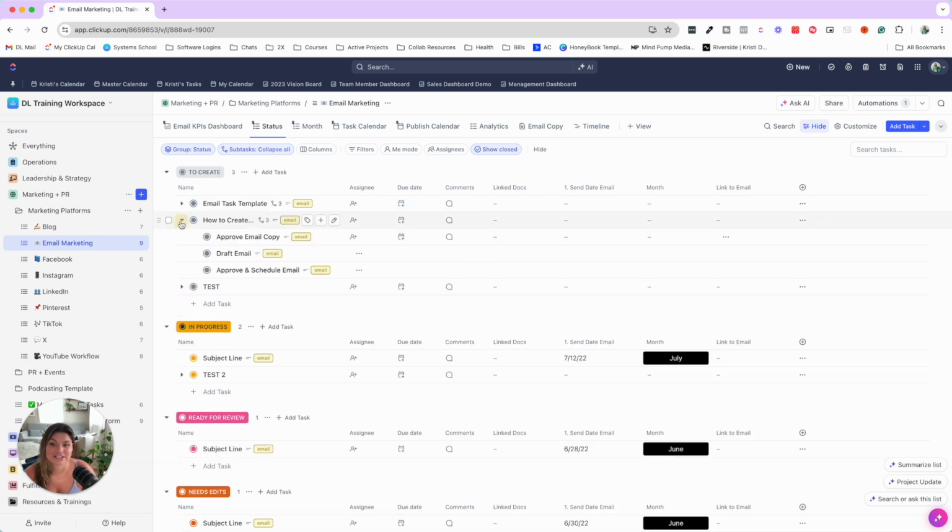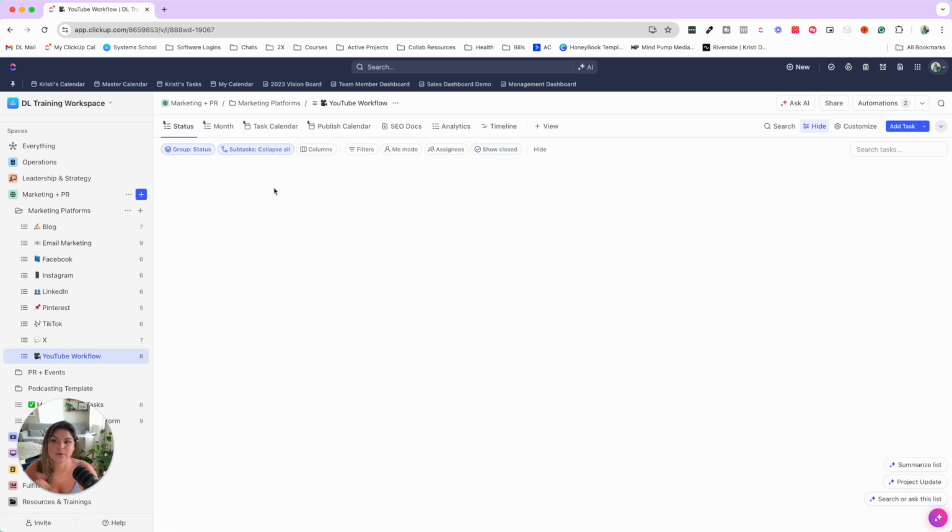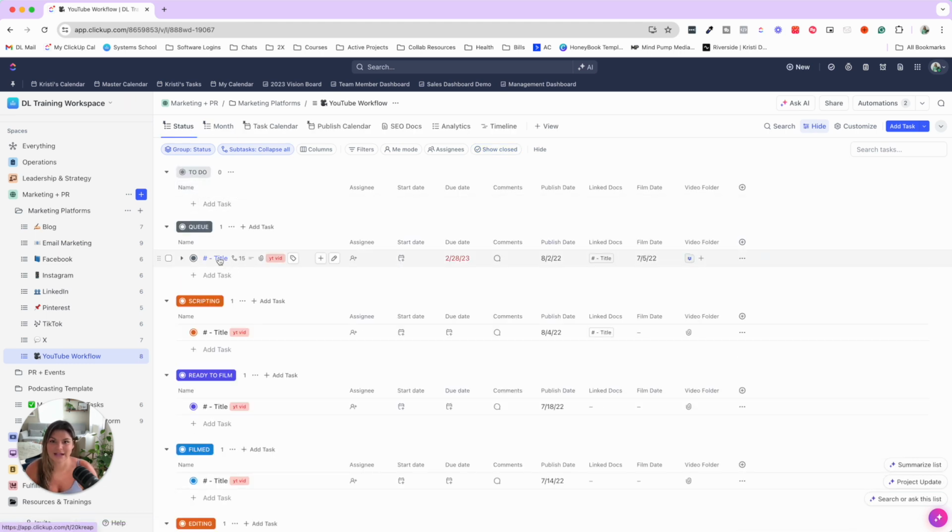Now, like I mentioned, if these do have subtask due dates in them, it will just update as whatever that subtask due date is in the template itself, which is most likely going to be overdue. So if you do have things like that, you will want to apply those templates manually so you can remap those due dates. This is currently how this is.